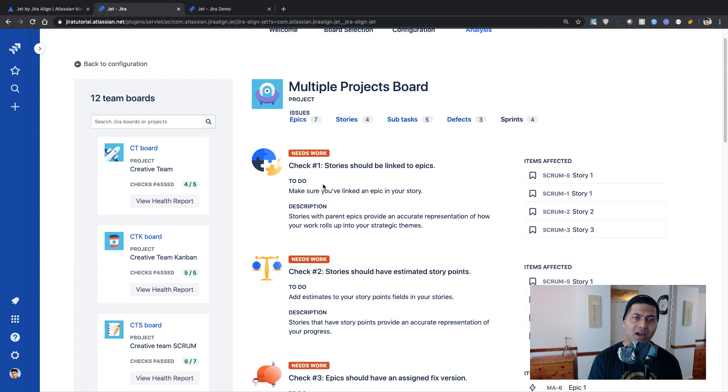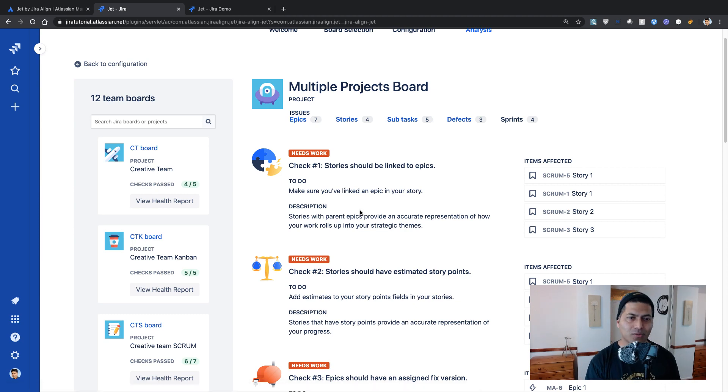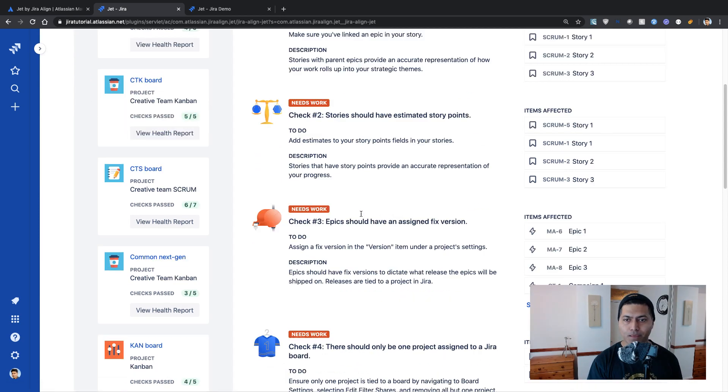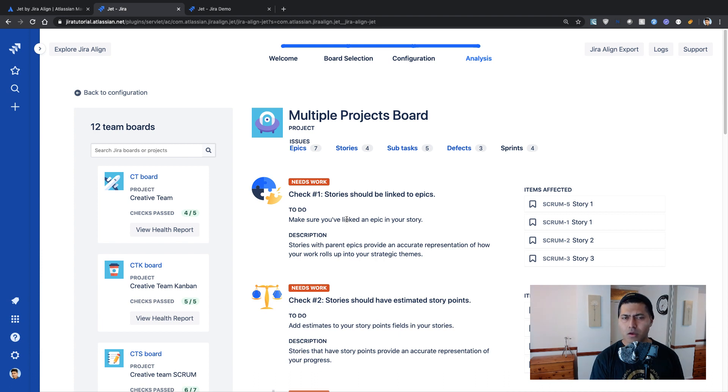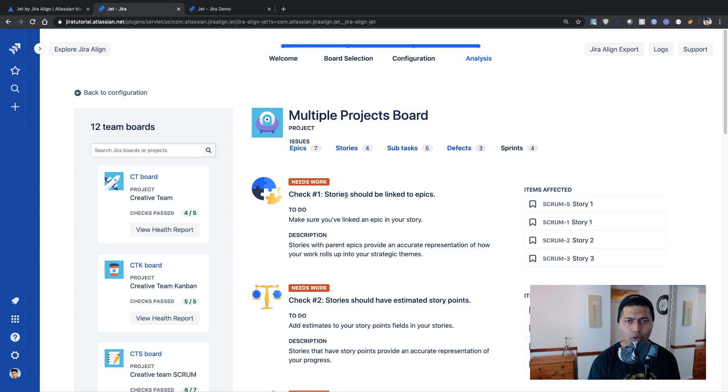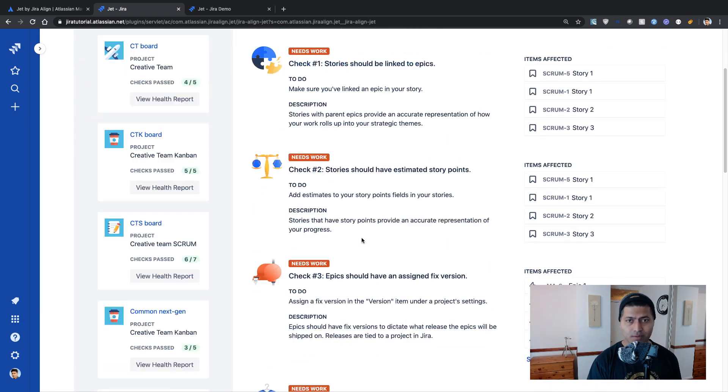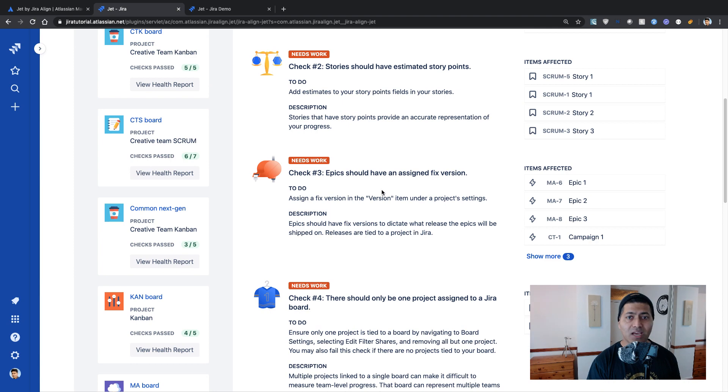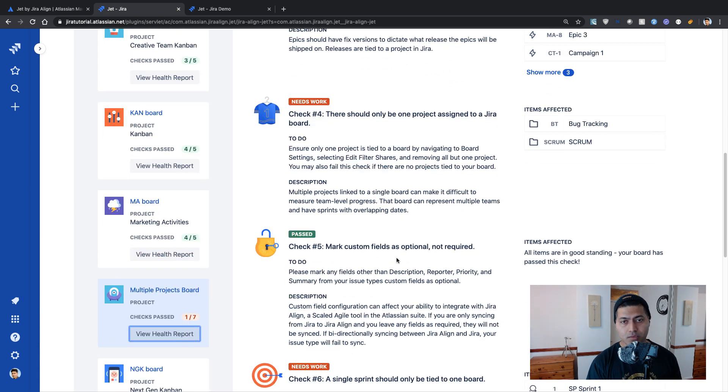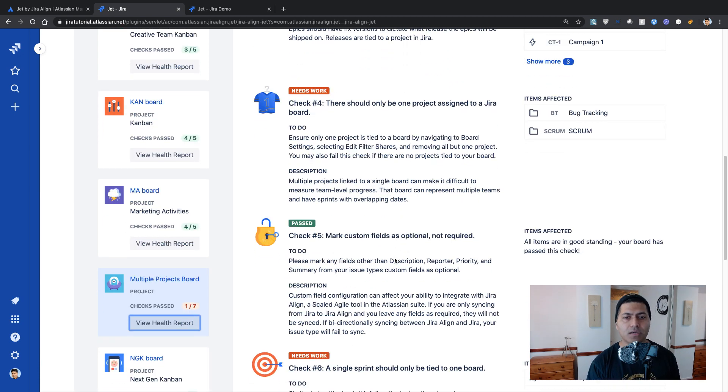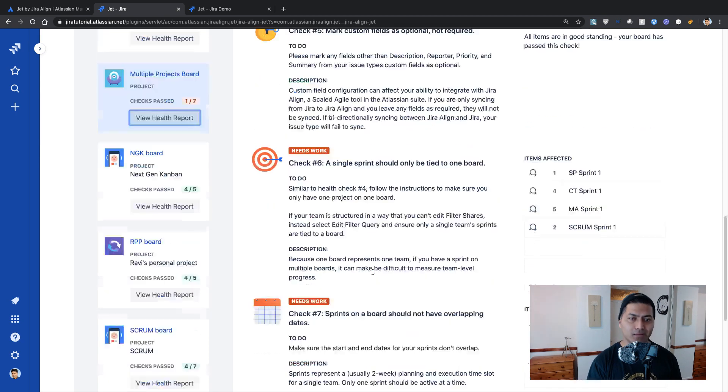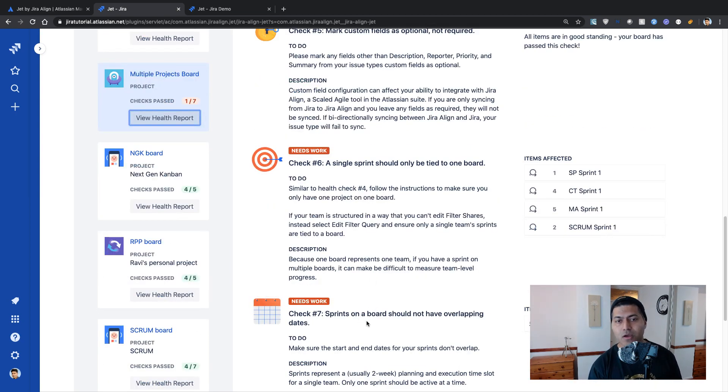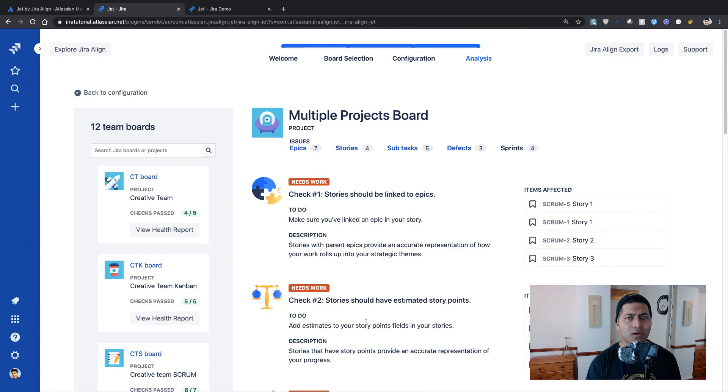So I actually created this board called multiple projects board, where I have issues coming in from multiple projects, obviously, and I also used the Jira next gen projects in this board. So it says the stories should be linked to epics, stories should have estimated story points, they should have fixed version, they should have only one project. I mean, they should only be one project assigned to a Jira board, mark custom field as optional not required. Okay, makes sense. Single sprint should only be tied to one board. Yes, I agree. That is correct. Sprints on a board should not have overlapping dates. Yep, absolutely. Absolutely.